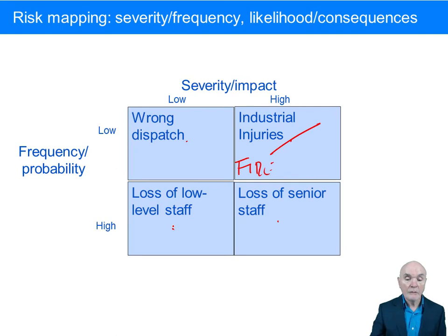And over here, where the severity is low but the frequency is high, we maybe have to live with it. It's going to have to happen here. Maybe we put up with it. Or maybe what we say is we will have enough other staff there who can fill the gaps, so this will keep the severity low.